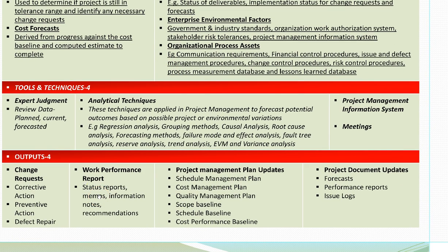documents. One of the outputs is the change request, which we receive from the client, the stakeholders, or the team. So it is a document. What are we going to do with that change request? We are going to have a corrective action, preventive action, or defect repair. If there are any changes that are implemented, what do we have to do now? We have to go and update the project management plans and all the subsidiary plans.